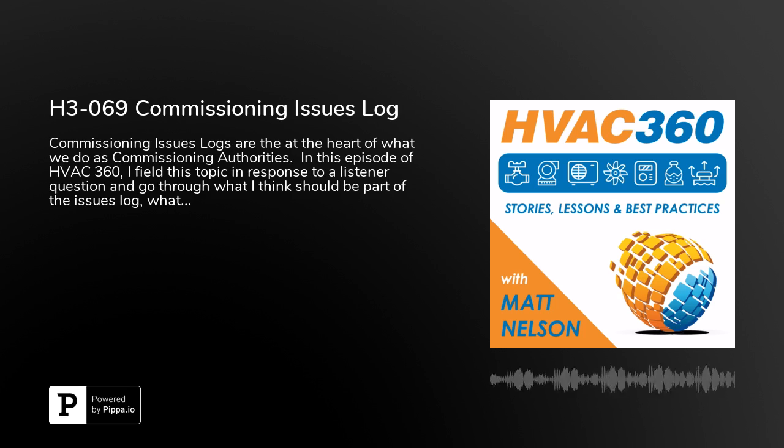The best thing you can do at this point is get him in a meeting with the owner and say, here's the issues log. When can I expect responses? I need responses for these issues to be able to close out my work. When can I get them? Get them on the record, and make sure it gets into the meeting minutes, so they're on record saying, yes, I will do that. Once it's in the meeting minutes and they agree, it really becomes on them. That's more binding to them than anything else.